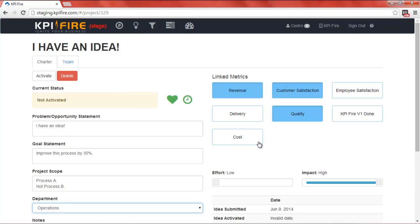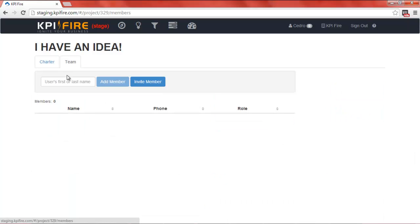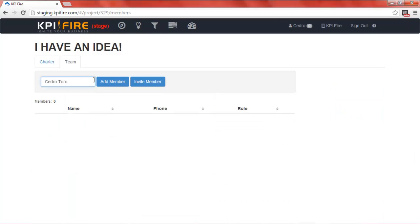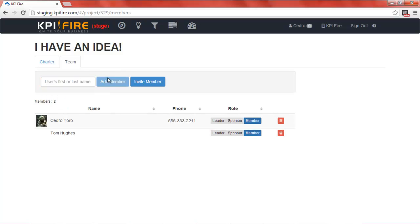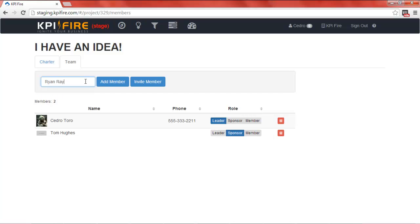Once I've completed the project charter, I may want to add some team members. I can find team members by starting to type in their name and add them here. You can also select which team members will be project leader, who will be a sponsor, and who will simply be a member of the team.